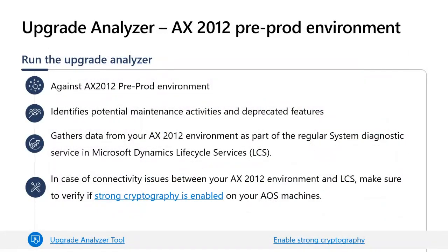So that was the first step — getting access to LCS and creating a project with the right methodology. The third step is to run the Upgrade Analyzer. The Upgrade Analyzer is a tool that runs against your AX 2012 pre-production environment, identifying potential maintenance activities — essentially cleanup steps that help speed up your upgrade by reducing database size and the volume of data that needs to be upgraded. It also calls out key deprecated features that need to be revisited.